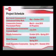That will go through about March of 2011. During fall 2010 and spring of 2011, we expect that there may be a couple of street closures during that time. Those should be the only ones, however, and you will get adequate notice prior to that happening. And then the full grade separation construction begins about March of 2011 and will go through June of 2012.